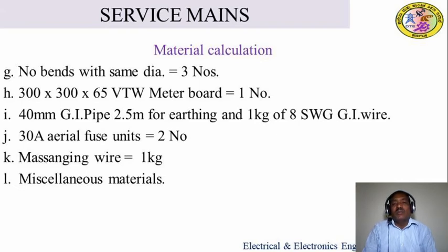So from the problem, what we have done: we have calculated the load current, size of wire, length of wire, service pipe, number of reel insulators, bends, meter board, earthing pipe, fuses, messenger wire, and miscellaneous materials from the given problem.